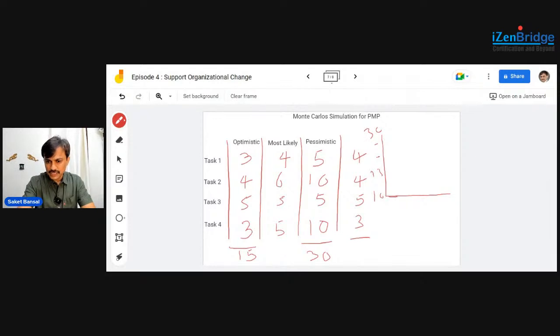So I may have a curve which starts like this, goes like this, and finally goes like this, reaching 0.9 by this much time. Somewhere it is 0.5. If I want to know how much time it will take in 20 days, I can plot a line and identify the probability of this project finishing in this much time. It's a little complicated and requires systematic tools. You may put probability and time on the XY axis in a reverse way. But the idea is that it helps you in projecting.